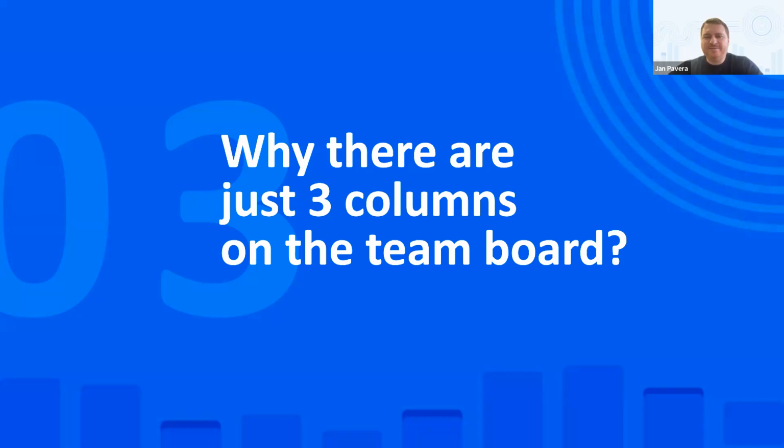Okay, nice topic. As you said, most common Scrum tools allow you to set up multiple columns, which basically represent the workflow steps or pieces of work split for the team members. And it can build a wall between the team members. They focus only on their part of the work, and it causes less team collaboration and rigid workflows.